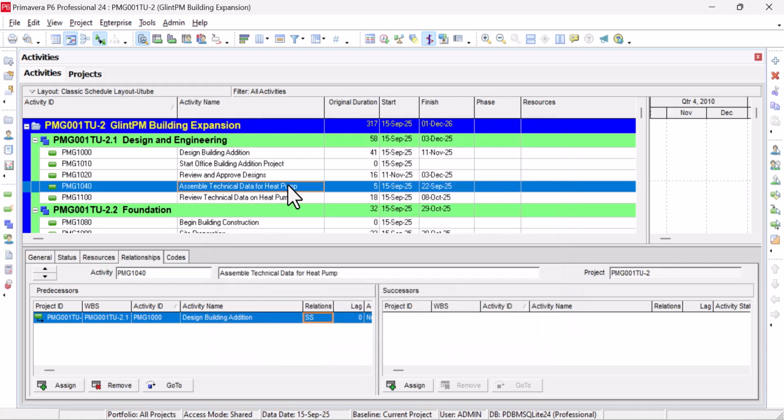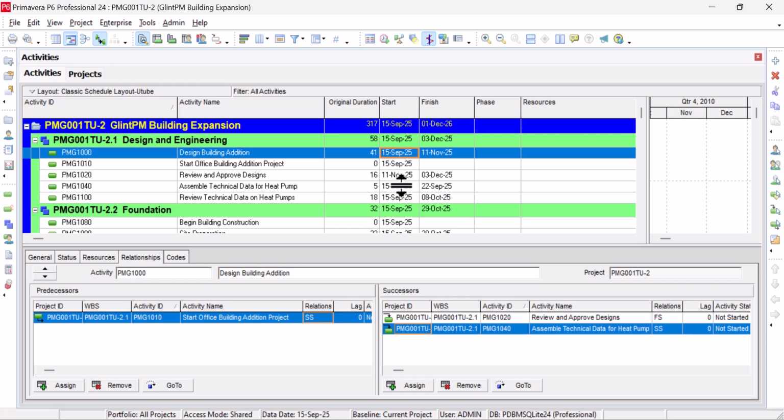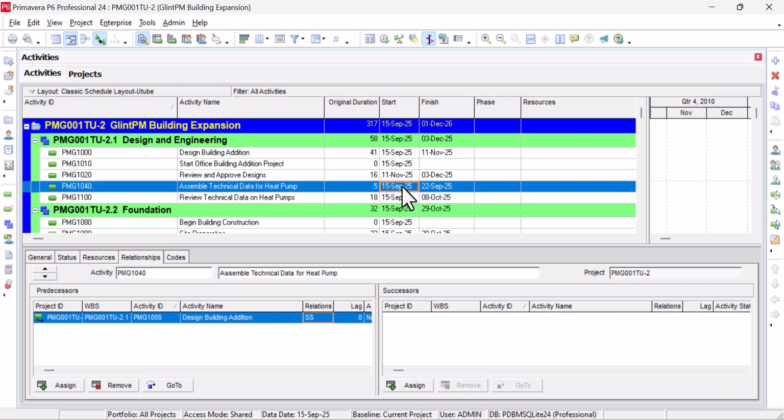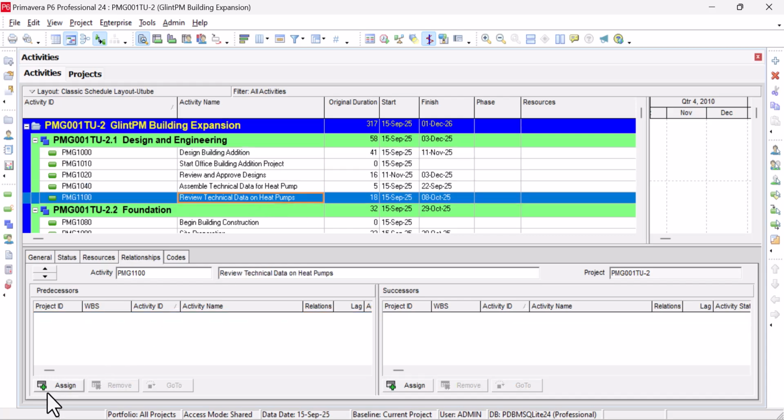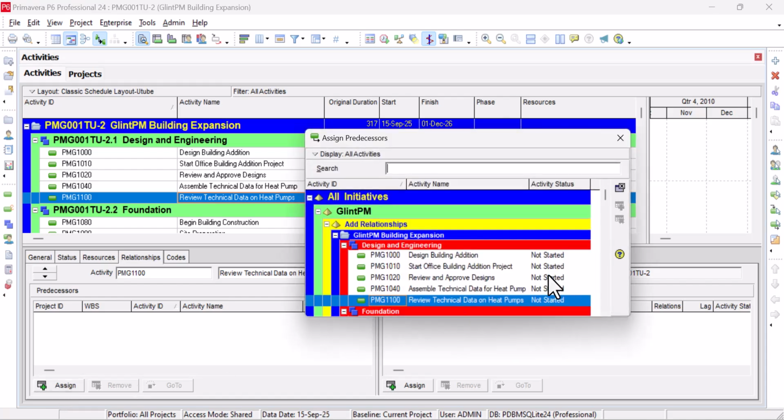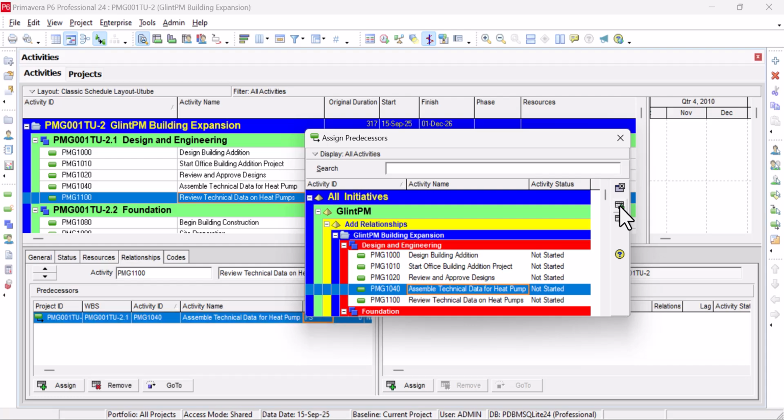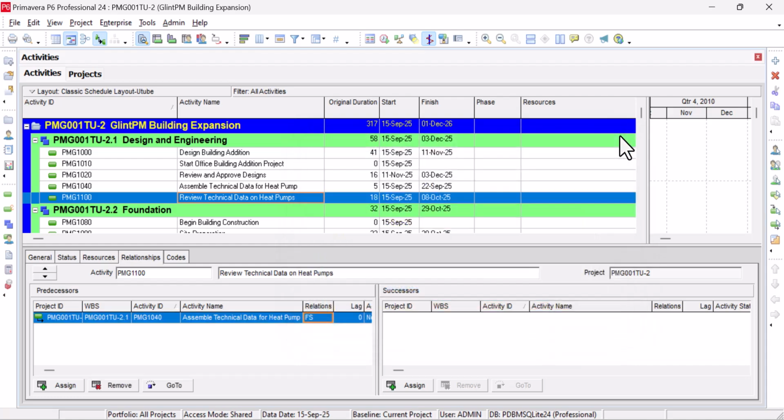That's what gives you the best logic, which is the critical path method that was used to design the software. The other types of relationship like start to finish should be avoided. Start to start and finish to finish should be used minimally. We'll also look at the rules later in the tutorial. I will show you how to check your schedule health.